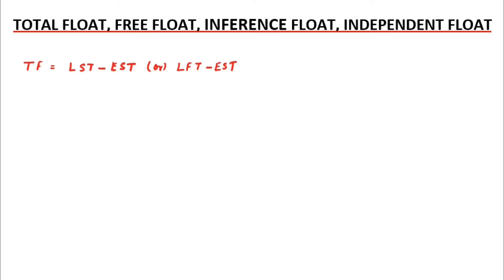Now for free float. The free float means the amount of time by which an activity can be delayed without affecting the beginning of the succeeding activities. Unlike total float which concerns the entire project, in free float the succeeding or beginning activity will not be affected by the delay. The formula for free float is: EST of succeeding activity minus EFT of current activity.